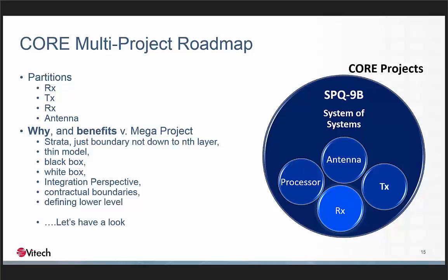Going back to that methodology where Crane becomes the system engineer, they'll have that level of detail. They're actually considering not only letting the RFP be based out of a model, but also requiring the bidders to submit a model back so they can evaluate what the impact of a particular design is, to really establish what the value proposition is. It's not only the acquisition of a subsystem or a component, but how does it impact the rest of the system? Those things have cost as well.